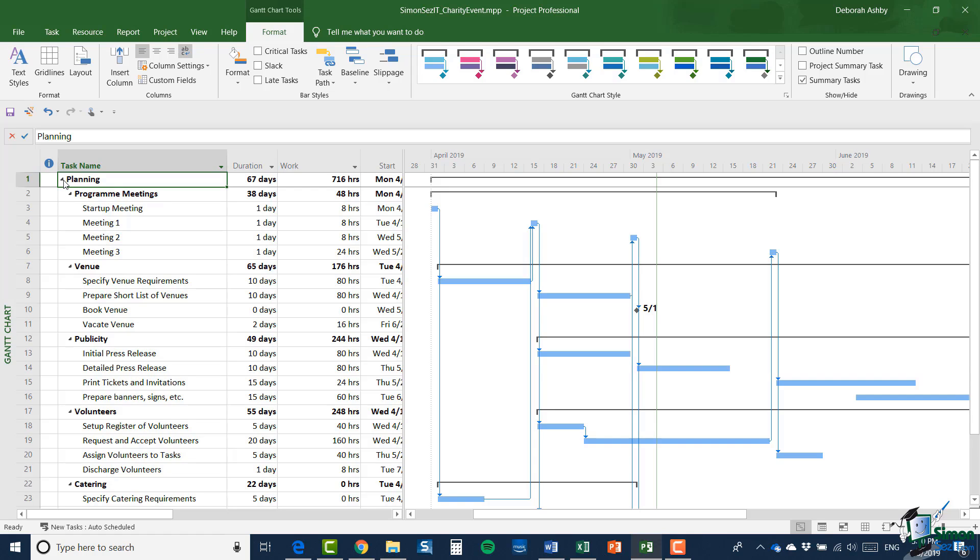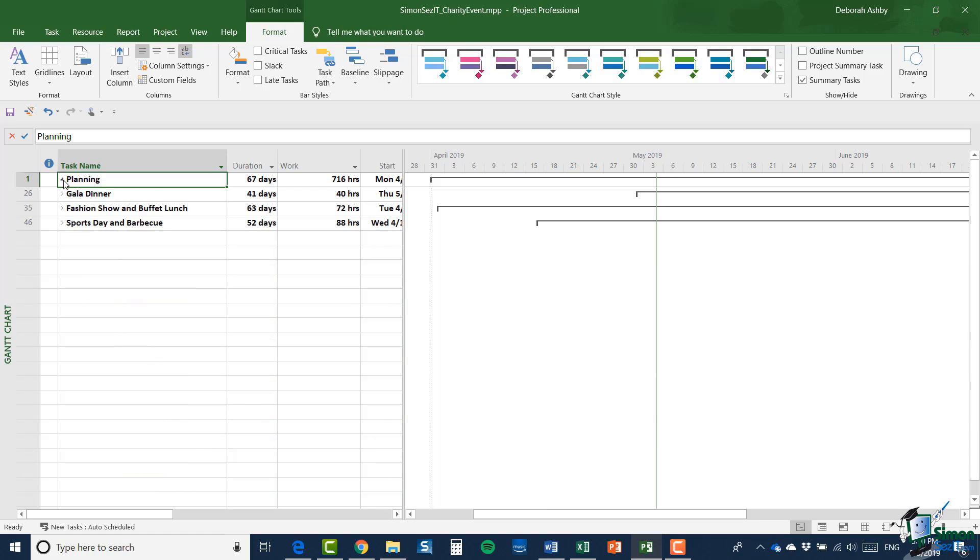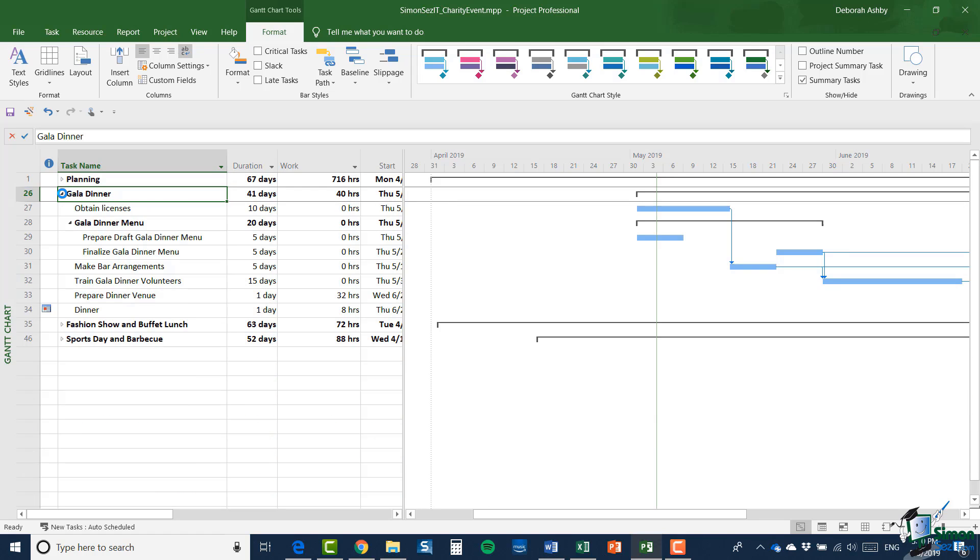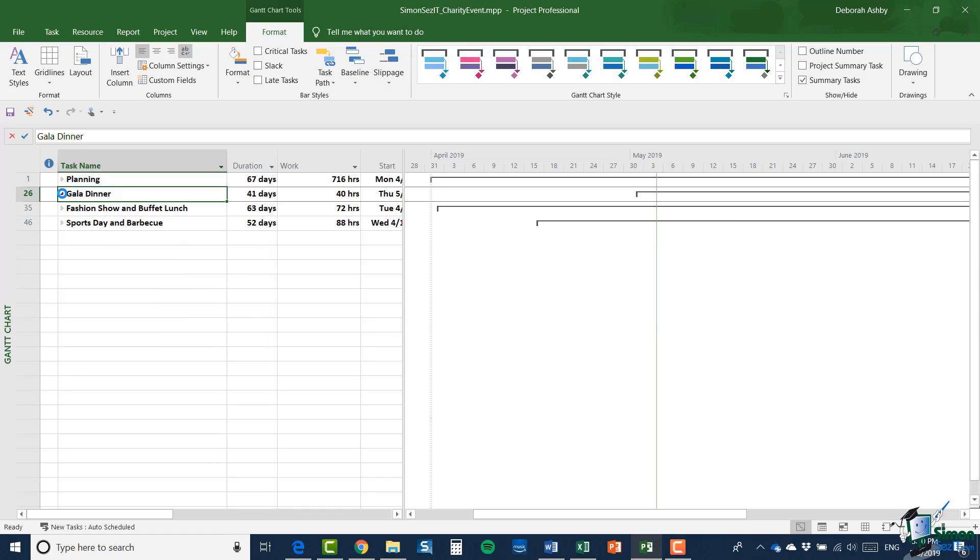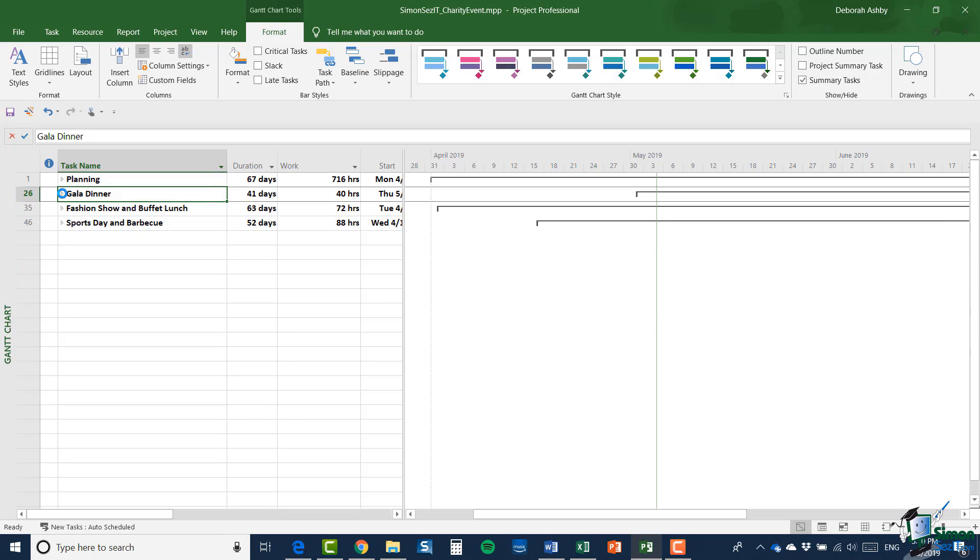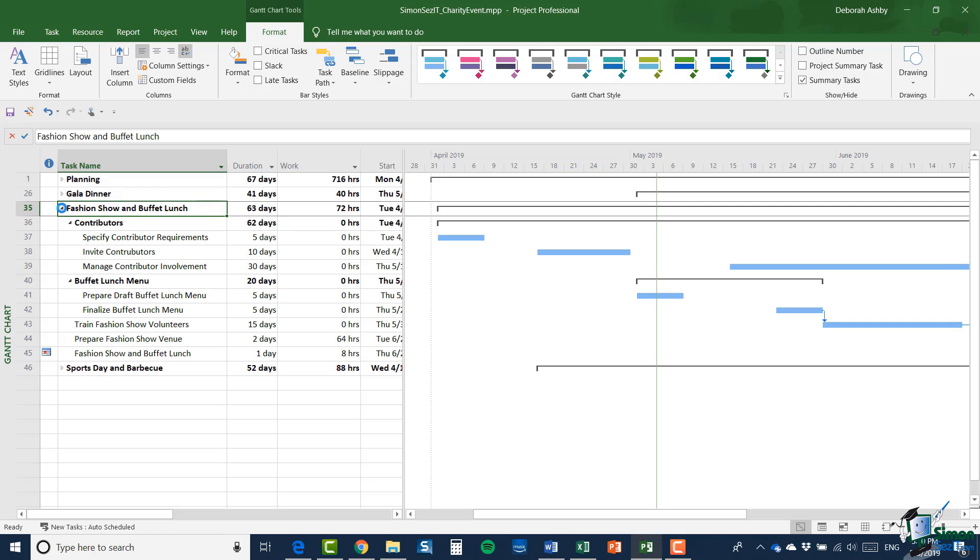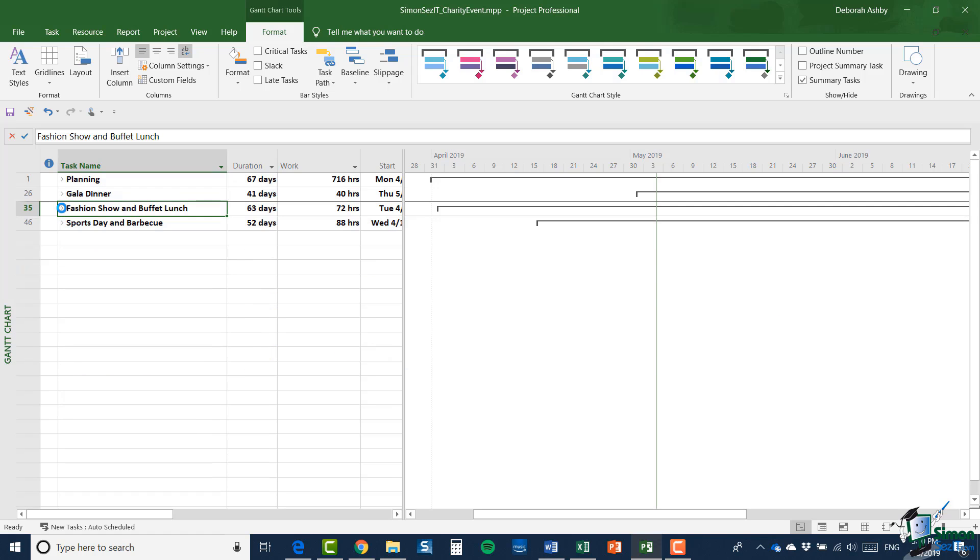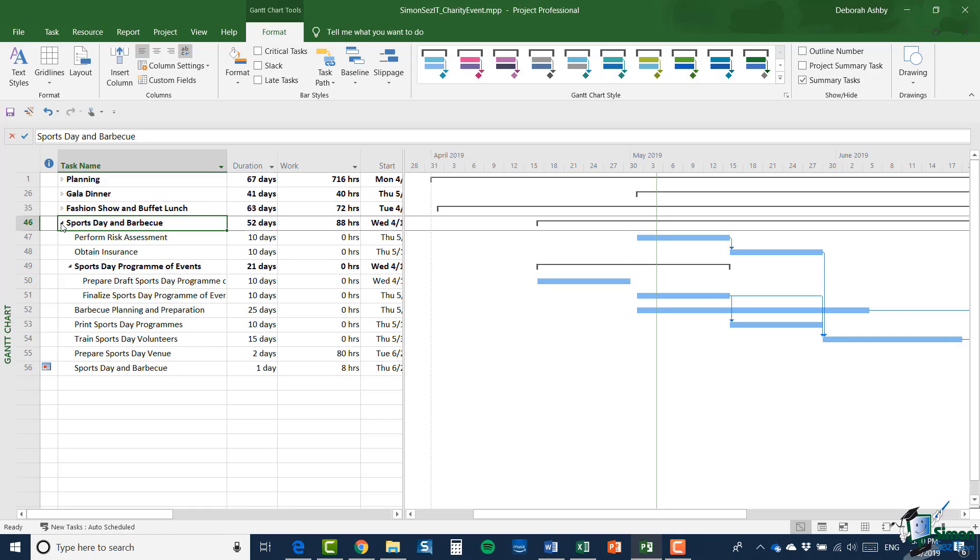And we've kind of now got to the point that we realize we're going to need people to manage each aspect of the event. So we're going to have one person managing the overall plan, another person managing the gala dinner, another person managing the fashion show and buffet lunch, and then finally a sports day project manager. Now the key point here is that although the individual projects are not really very complicated at this stage, maybe about a dozen or so tasks in each, we need each of the project managers to be able to manage their project independently and separately.